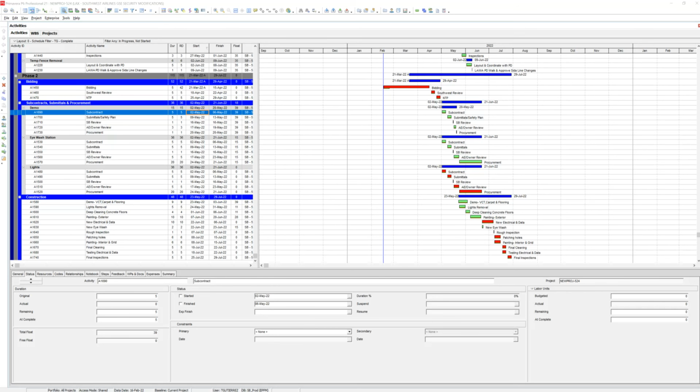So now the installation of owner furnished items, MEP install for demo. So I think you have demo of ceiling tiles. So in here, I do demo VCT carpet flooring. I planned to do it there. I didn't. Yep, let's put it in. Tiles. Okay. What else? New lights. Okay, the new lights you had in here. And here, the only reason why I would do it separate is this, and I'll show you. Let's say, is the lights gonna stop all your electrical and data work? No. No, right? So let's just add a new activity for lights.